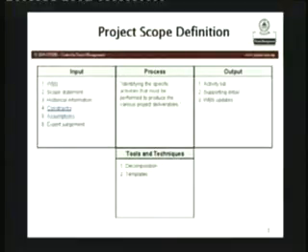To do that, I need the WBS. WBS is work breakdown structure. We'll see that in a few minutes. Scope statement, a very clear statement of the scope. This you've clarified with the sponsor and the user groups that will be interacting with you. Historical information, constraints and so on, and of course expert judgment. There are people who are seasoned in that kind of project. Someone who's worked on 5-6 projects overseas has a pretty decent idea what things fly, what things don't fly. You don't need 8 wheels for an airplane to land. You need maybe 2 or 3 wheels. Those are things that are known to people who have already gone through the process.